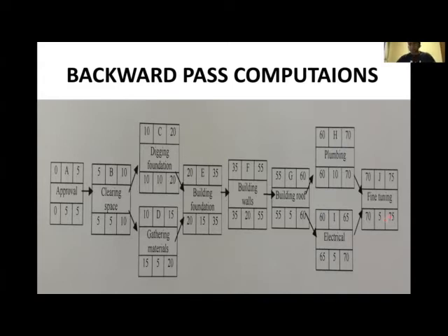So you say the duration is 5. All right. The duration is 5. And what is the late finish? Is 75. So you say 75 minus 5. What do you get? You get 70. Now, a split is same as a split when going forward. So just duplicate this late start on both here. All right. So 70 comes in.